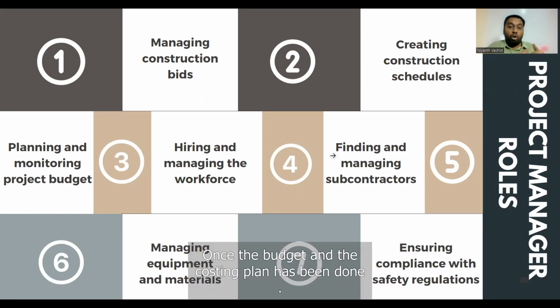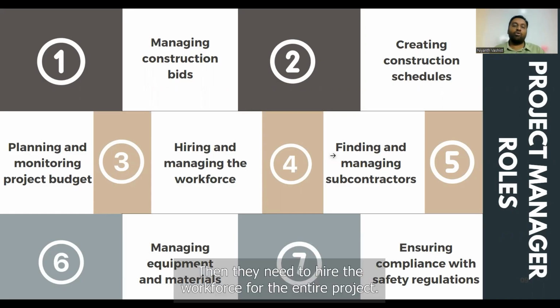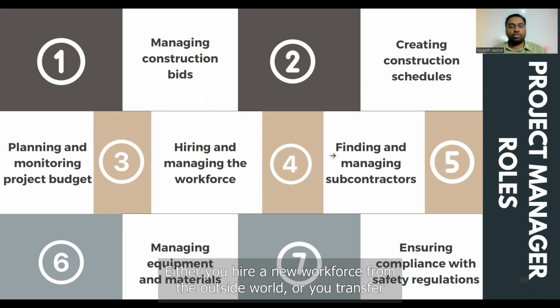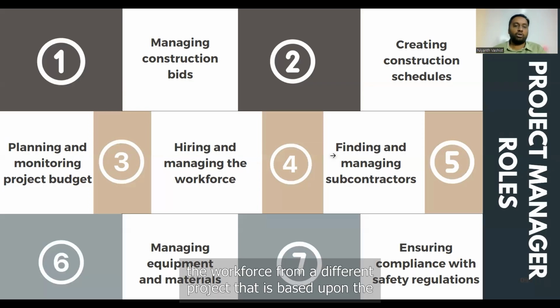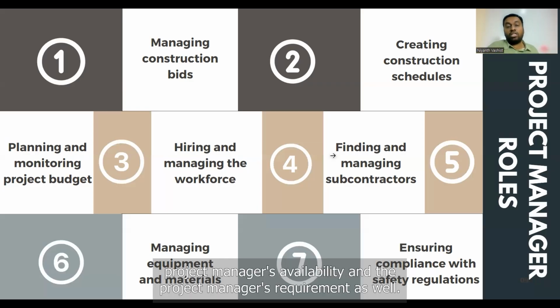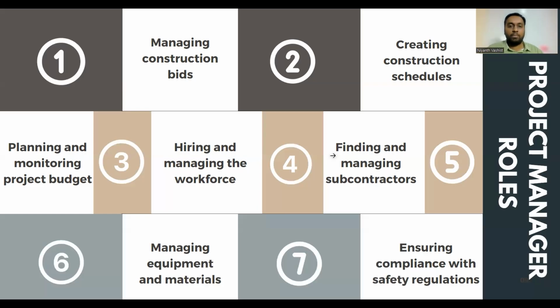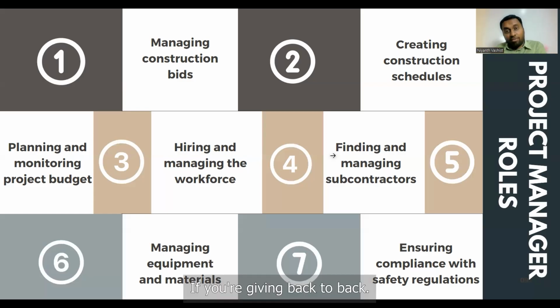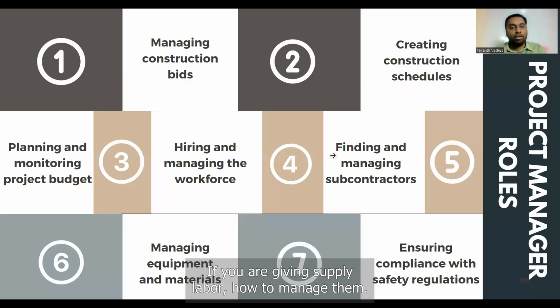Once the budget and the costing plan have been done, they need to hire the workforce for the entire project. Either you hire a new workforce from the outside world or you transfer the workforce from a different project. That is based upon availability and the project's requirement as well. The next job will be to find and manage the subcontractors. If you're giving back to back, how to manage them? If you are giving supply labor, how to manage them?